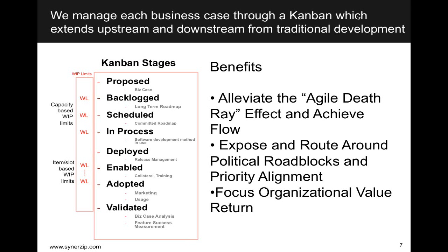And the real operative gates for those early stages is business case development. And what you'll see then is you can start to manage your long-term roadmap gated on business case creation. Once you have your long-term roadmap locked, then development organizations and your product managers can start to pull from that backlog of valuable business cases into a committed roadmap.